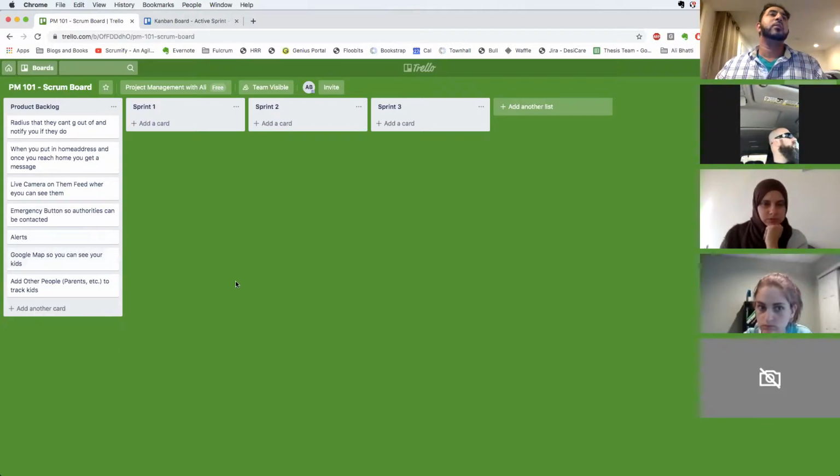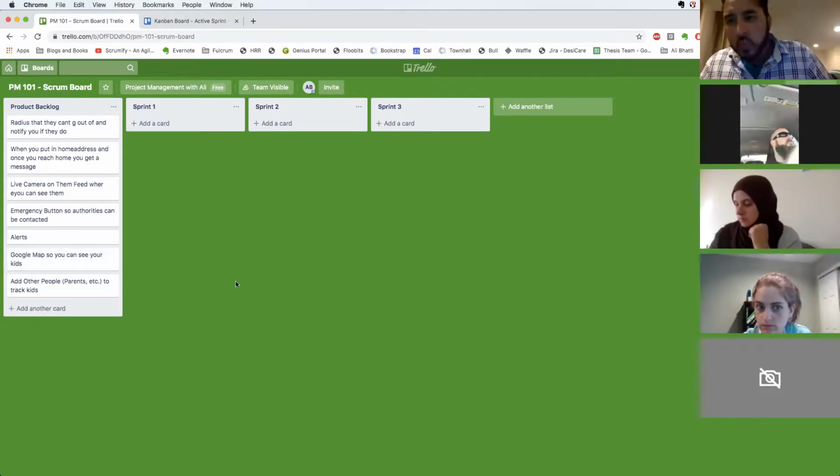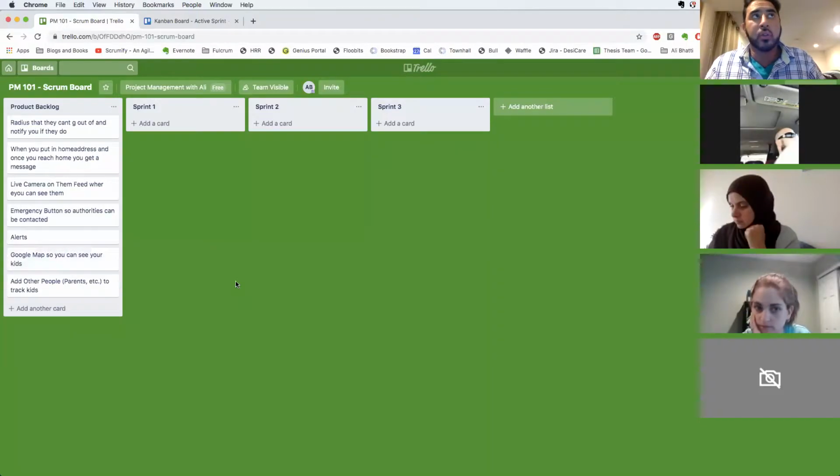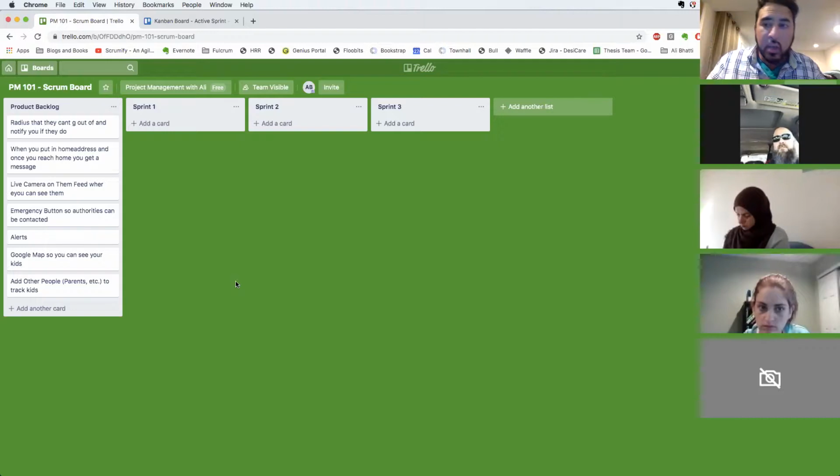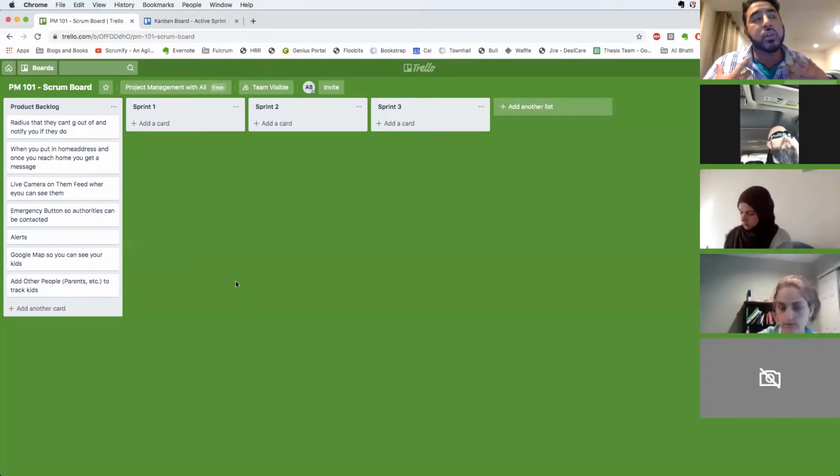These are great. So now imagine this is a product backlog. Once a week, you meet with the product owner and he has all these ideas. The second meeting that you do, at least once a week, sometimes twice a week, is called a grooming call. In a grooming call, you go through the product backlog and start working on the requirements.